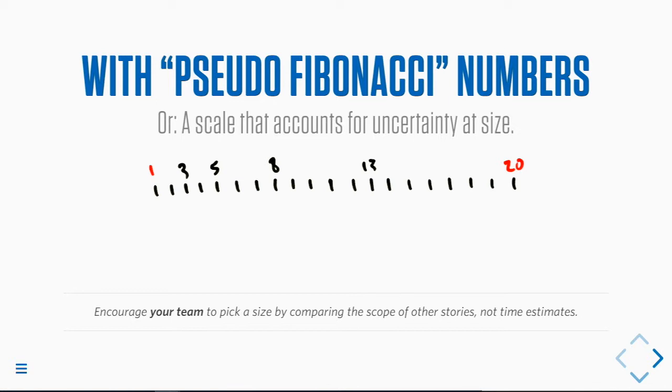And shirt sizes can help sometimes if the numbers are a problem, because eventually you're just going to have to stop saying points are not hours. We've all had clients that have a hard time detaching that, especially if people are coming and going from those stakeholder meetings. So, a small is a 3, an extra large is a 13. I don't like it as much because it means that the project manager is sitting there converting words to numbers as they go into Jira, but it can be helpful for some clients.